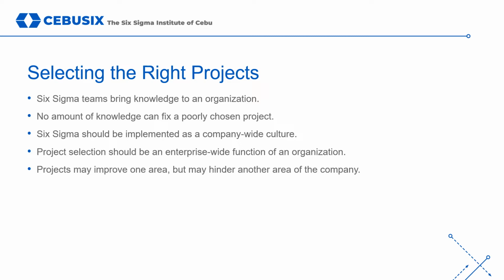It is also important to include projects addressing critical problems that must be resolved in order for an organization to be successful in the next year. A project should represent a breakthrough in terms of major improvements in both process performance and significant bottom line results. The project should be doable in 4 to 6 months.